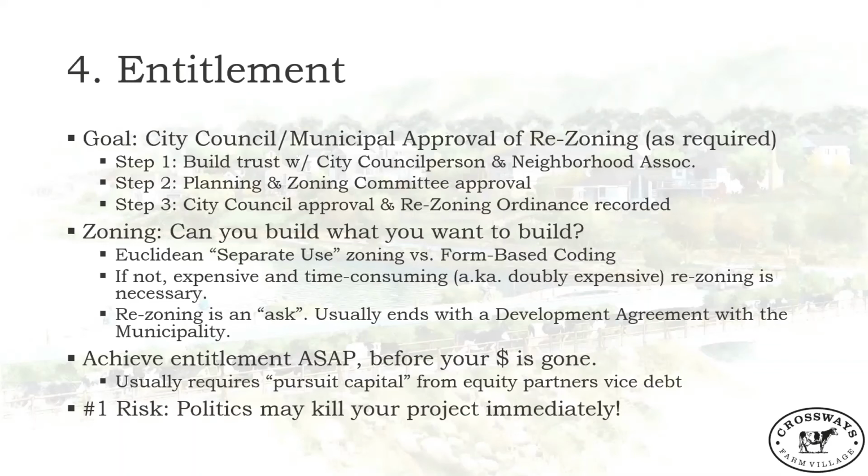But once city council approves, you're able to build what you want to build by right. You've got the legal right to build it, and so you're vested in the property. That's a really critical concept to grasp as well, vesting in rights. Once you skip this hurdle, because it's the number one risk in development, because it's just politics, you really can get comfortable with spending equity dollars and move forward.